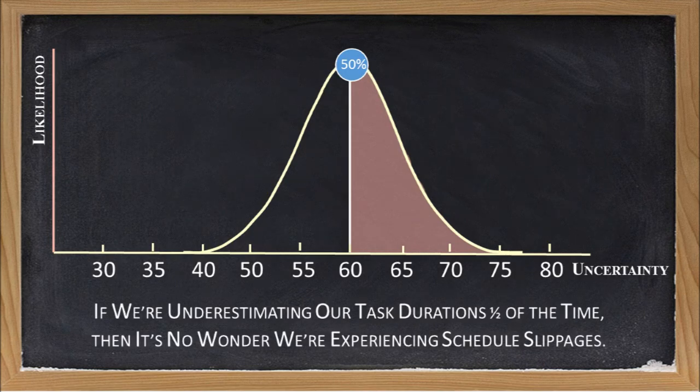Keep in mind that when we were told that an interview takes approximately an hour, this is correct. An average interview duration is an hour in our example. It's just that in practice, they are likely to be more or less than an hour, which leads us to either over or underestimate the required durations. Of most concern to us as project managers are the cases where we would have underestimated the interview duration requirements. In these cases, we would experience schedule slippages.